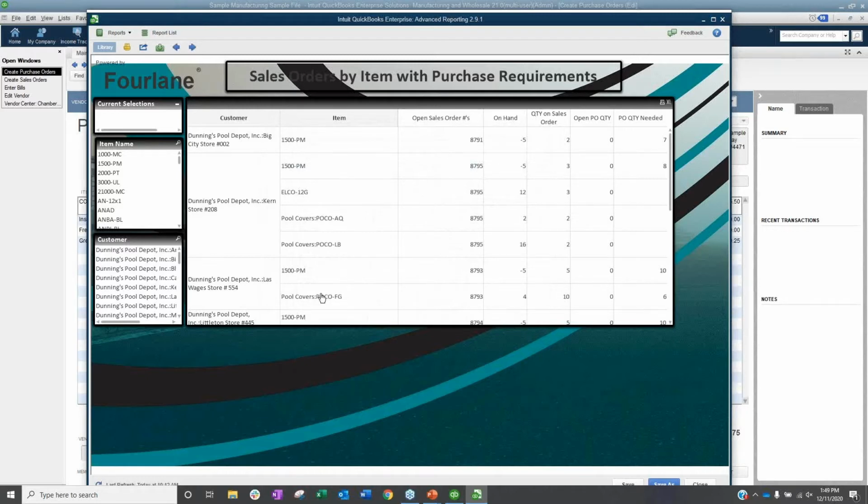So they had to figure out before, who have I bought for? Who have I not bought for? What do I need to buy for this job? When does it need to come in? So we added some additional customization to this base report to include date ranges as well. And so they were able to use this report, say, okay, what do I need to order for my jobs that are being completed next week? What's on a purchase order already, and what still needs to be ordered?